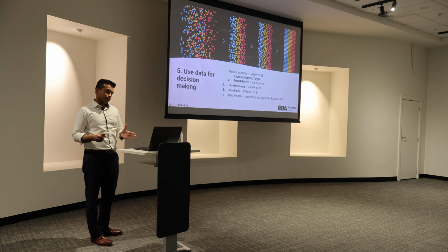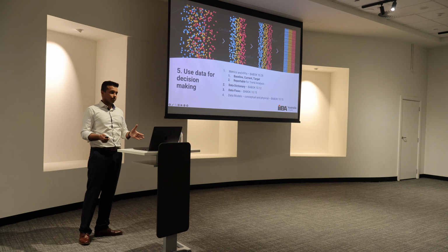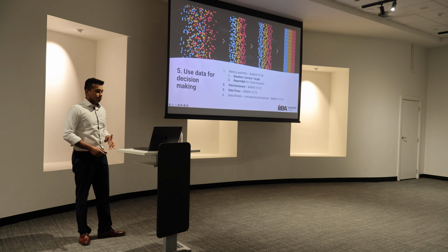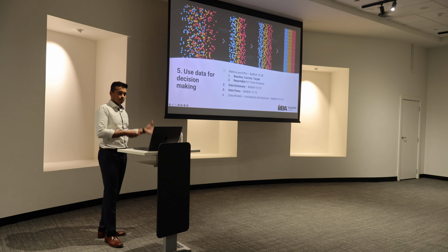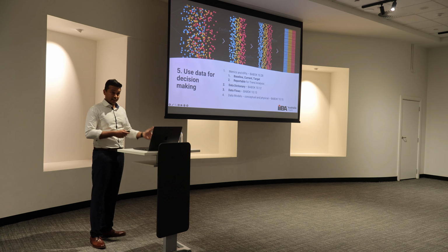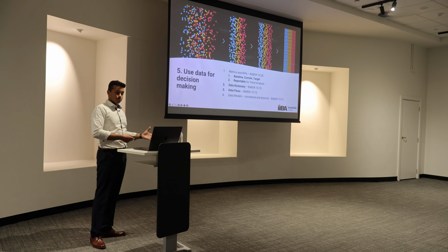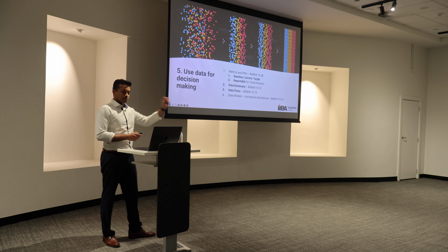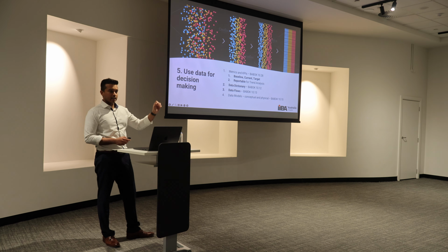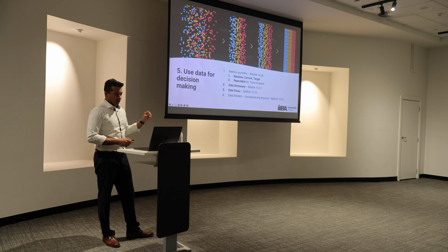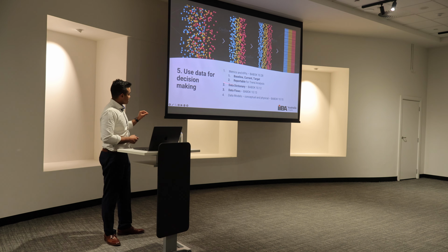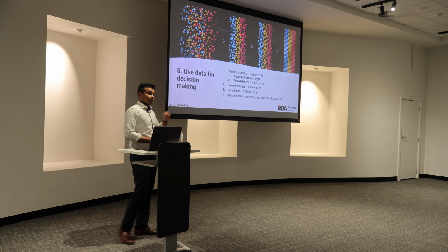And you'll probably have to work with your PM to figure out 2 kinds of metrics. One for the project, because sometimes project managers do need that help from a BA. That's stuff that you can figure out early on, set it up, and let the project manager then track things like velocity, burn down, story points, whatever they call it. But if your project goal is around measurable improvement of efficiency, time, cost savings, or production, then you need to work with your SMEs a little earlier to figure out what their baselines are for the industry, what their current numbers are and what their target is that they expect after the project.